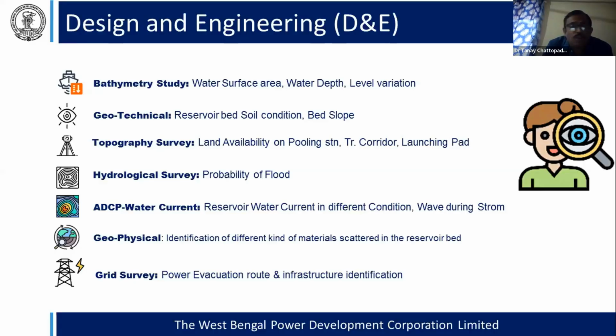So you have to consider it. Then geotechnical survey, water sample collection should be required, and the bed slope should be taken. This survey should be required, and the topography survey should also be required. Okay, and the historical hydrographical survey, if there is any flood, this should be done, and this is acoustic